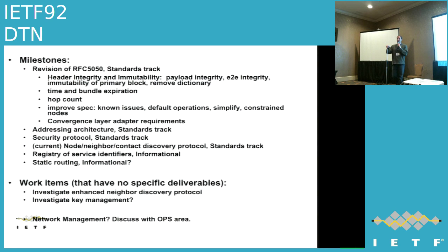I'll leave it to the people who are writing the documents and discussions within the working group to see if we can actually hit those kinds of time frames. Even if at the end there's a graph of dependencies between the documents, we expect to work them in parallel and to converge at some point. So we should not start with one and have everybody waiting for the first one to finish. Even if we know there are dependencies, we can work in parallel. So that could help, finishing in this decade.